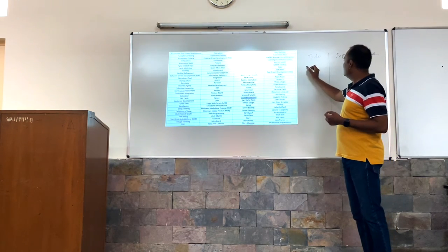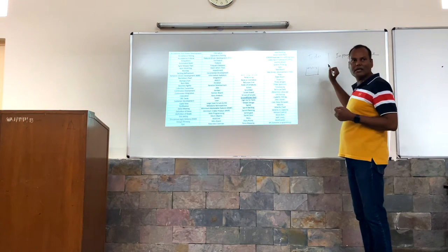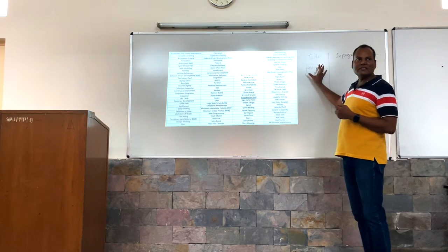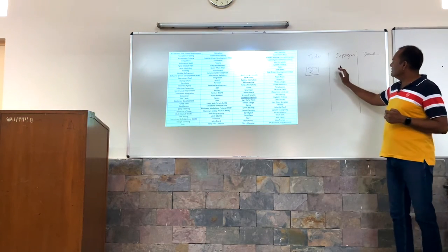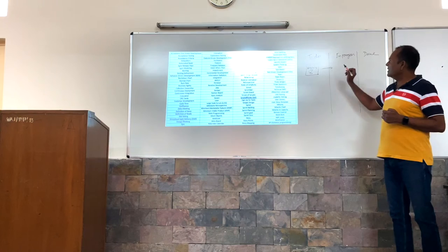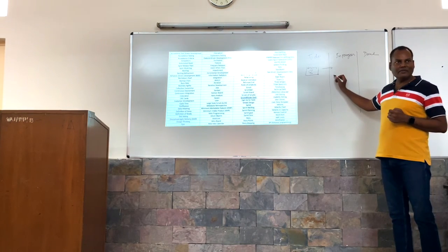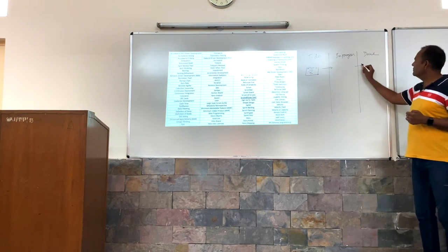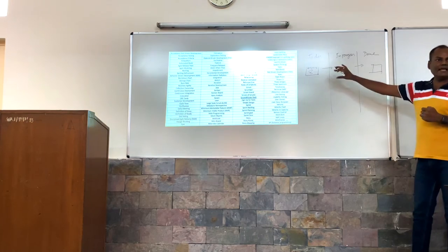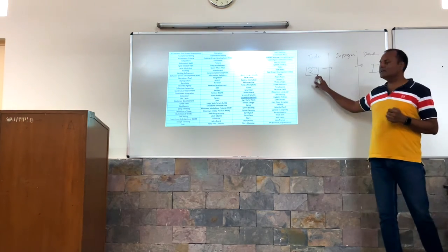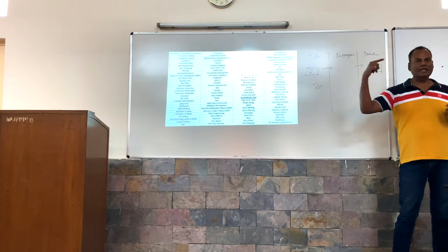Let's suppose on one sticky note, Abhishek is working, and the size of this work is 8 story points. I'll give you one example. When I start working on this, I move it from to-do, and my cycle time starts. When I finish my work and it is moved to done, the time from start to finish is the cycle time. Maybe I take 2 days to finish this work, so 2 days is my cycle time to finish one entire piece of work.